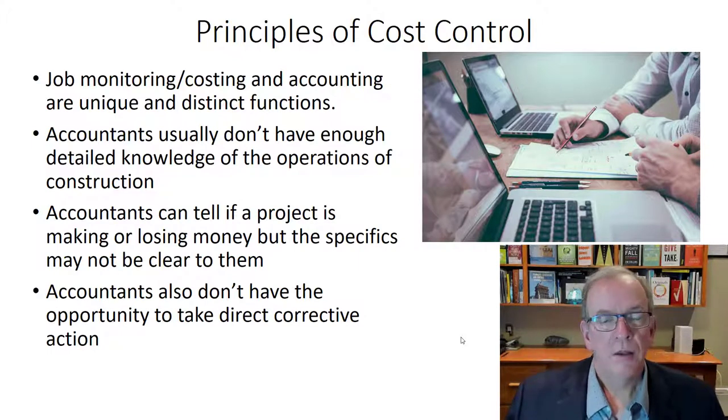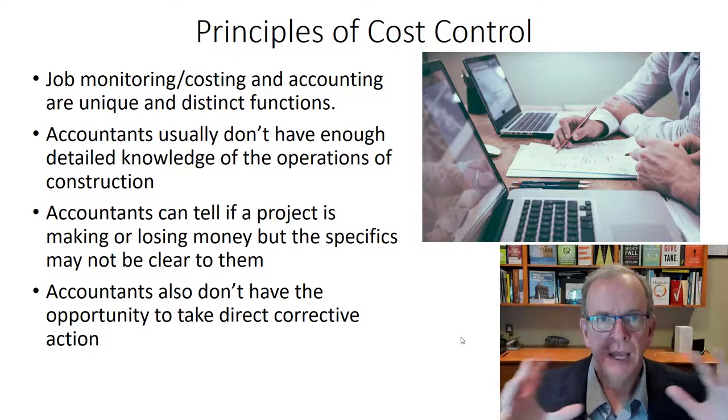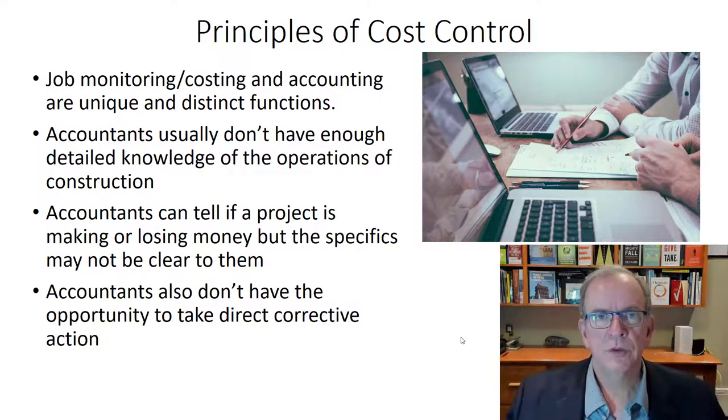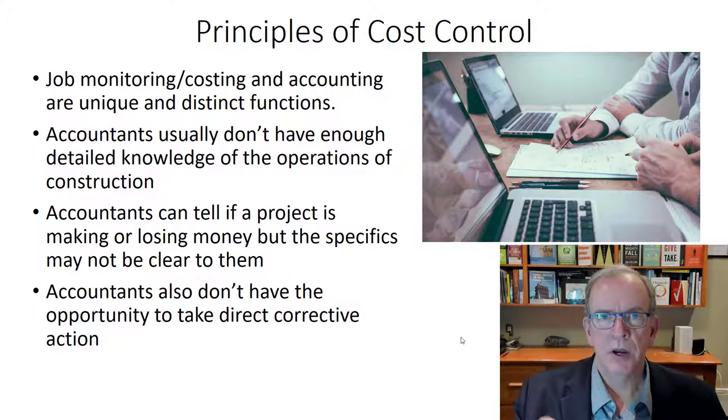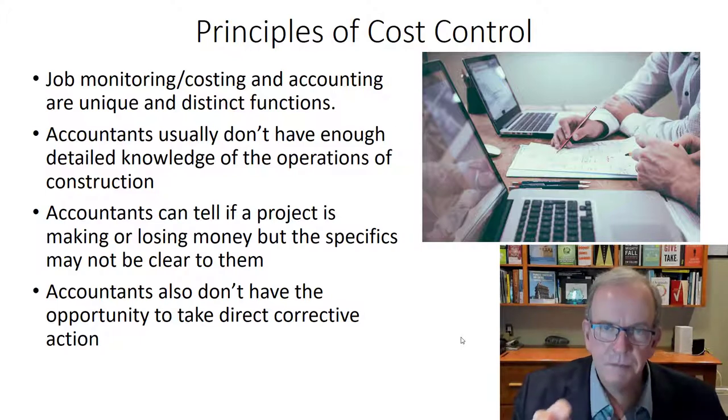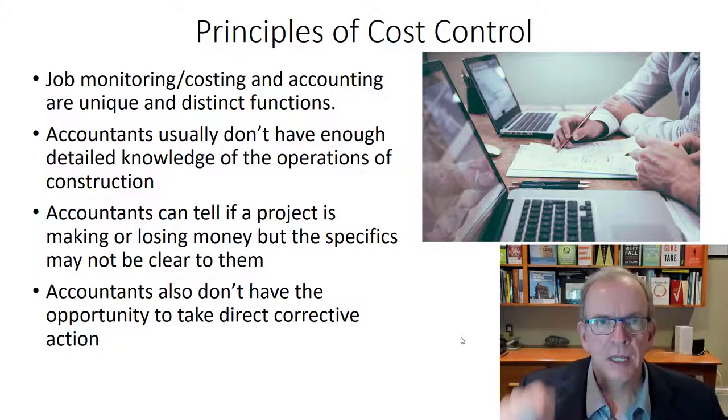So as I was mentioning with accountants, when you've got an accounting system and a cost control system and the gathering of data and inputting the information, they're very good at seeing that this project is losing money at a higher level, but really breaking down when you see in this particular area it's losing money, and why it is losing money in that particular area, not so good. That's really where the site team comes in.